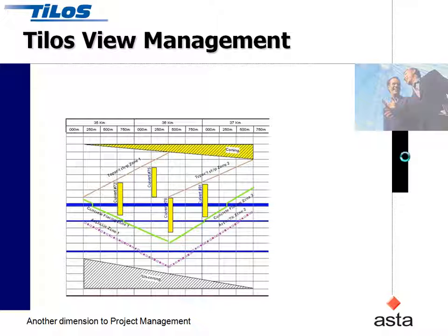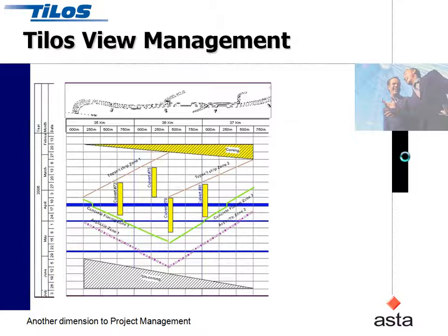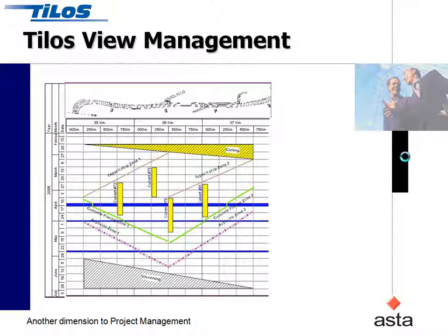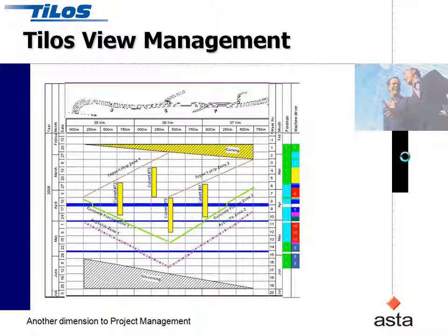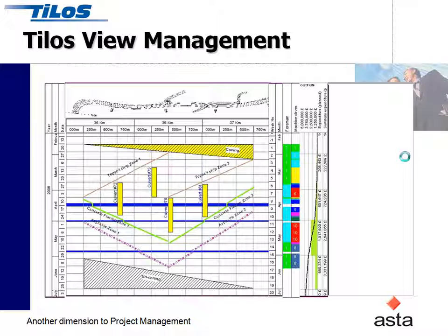But then we include a second cell which includes a distance ruler, and we can create that ourselves and set whatever fonts we like. We can put a map or a number of maps of the project at any point. We can put a time ruler in another cell on the left hand side and say how many columns it should have, possibly a different one on the right hand side. If the project's got resources, we can map those resources in various graphs, and if there are costs, we can map those costs in various graphs so we can see the cash flow and resource usage.